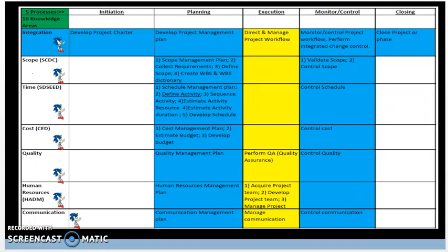Once requirements are agreed upon and signed off from stakeholders, this is the point of no return from major changes. Keep in mind, change requests can be raised by the team as needed, but having excessive changes can result in scope creep and gold plating.